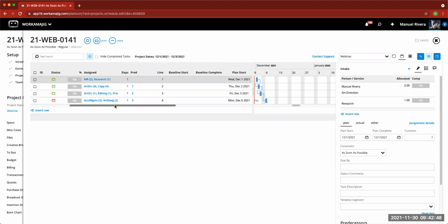Okay. So just to let you know that the due date is really more of a reference point or flag. Because my days, I moved them up from today to tomorrow, and I had a reference endpoint selected and the due date as the 3rd of November, you can see already in the Gantt chart here that I pushed my last scheduled date to next week.